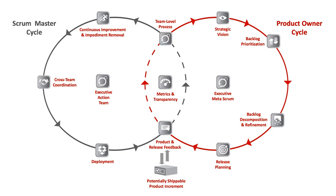Backlog decomposition and refinement goals are to break complex products and projects into independent functional elements that can be completed by one team in one sprint, capture and distill emerging requirements and customer feedback, and ensure all backlog items are truly ready so that they can be pulled by the individual teams. Release planning goals are to forecast delivery of key features and capabilities, communicate delivery expectations to stakeholders, and update prioritization as needed. Release planning may encompass one or many releases of the product to a customer and is a higher-level planning horizon than a single sprint, usually covering a period of one to six months.